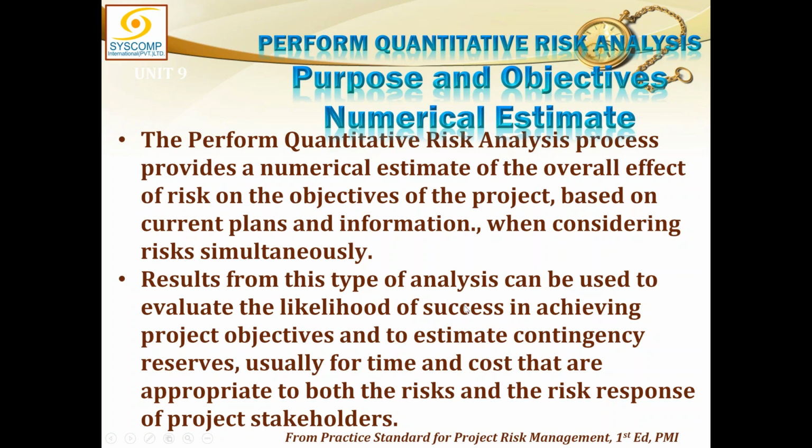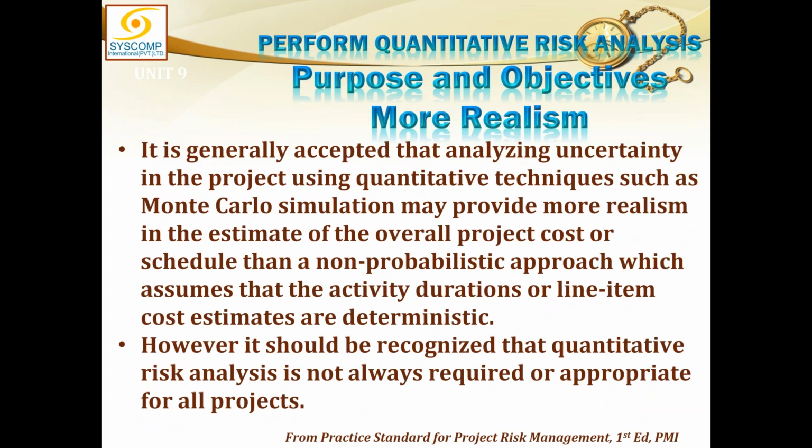So talking about the numerical estimates, the perform quantitative risk analysis process provides a numerical estimate. This I've already covered, I think. It is generally accepted that analyzing uncertainty in the project using quantitative techniques such as Monte Carlo simulations may provide more realism in the estimate of the overall project cost or schedule than a non-probabilistic approach, which assumes that the activity durations or line item cost estimates are deterministic.